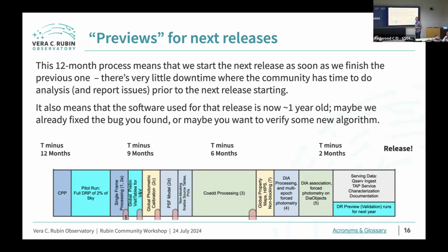Yeah, this is Will. So the compute model assumes there's a scaling to that. And there are more computers bought every few years, so it's not the same amount of compute in year 1 as in year 10, to try and keep the time about the same, as much as we can. It could be completely wrong, but we'll find out in year 2-ish, maybe, when the data volume doubles, as opposed to increasing by 10%? Exactly. For me the second year is the real killer.